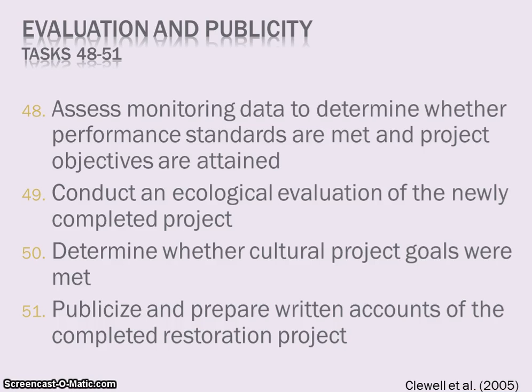In Step 6, Evaluation and Publicity, the restoration practitioner and restoration team will evaluate the monitoring data and correct or amend the project if necessary. This is a step towards adaptive environmental management. Step 6 also includes preparation of the final restoration report. Regarding publicity, this is the step where the project manager publicly celebrates the project completion.